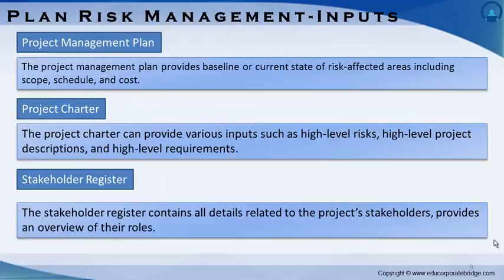The charter is needed in risk management planning because it identifies the business need of the project and the overall project description. Risks that can prevent the project from satisfying the business need of the project must be addressed during the course of execution of the project.